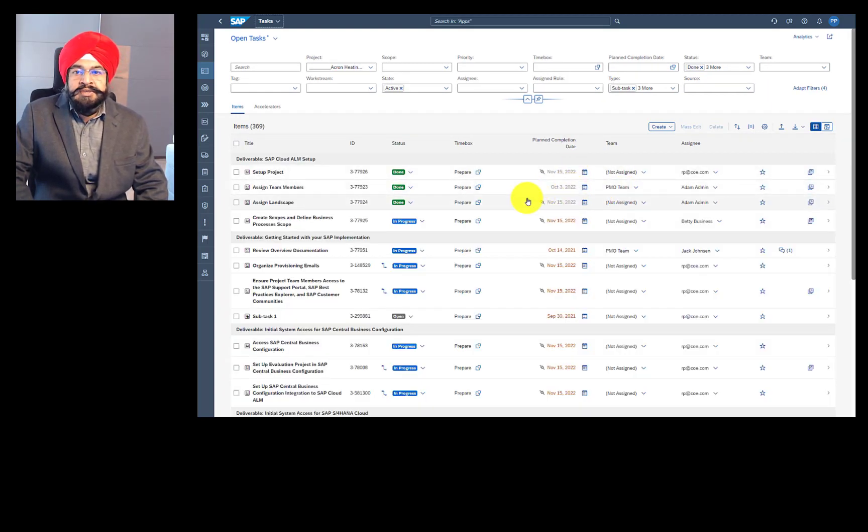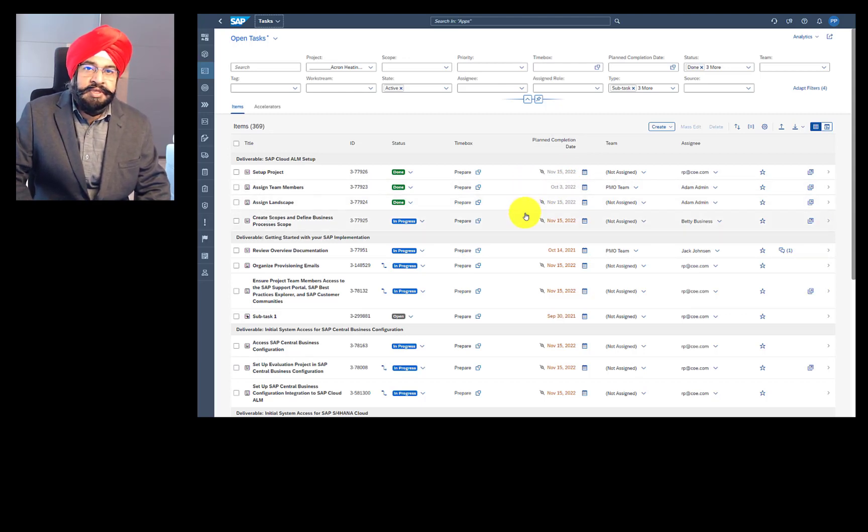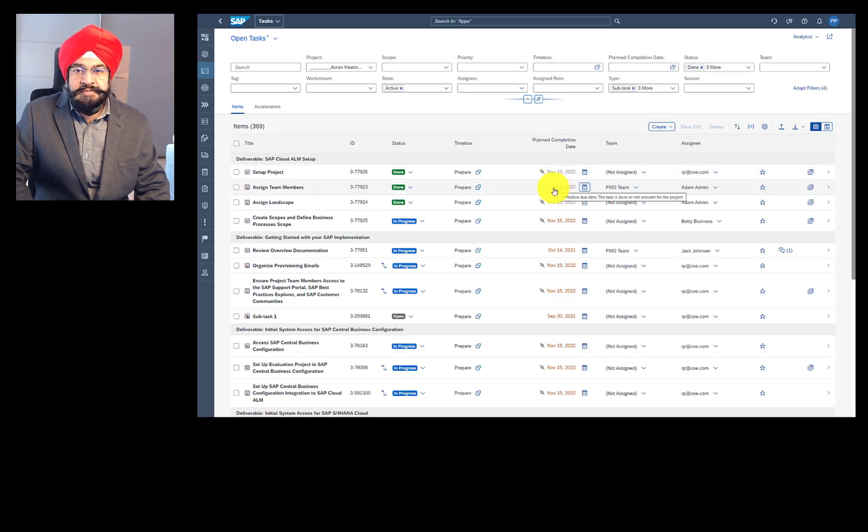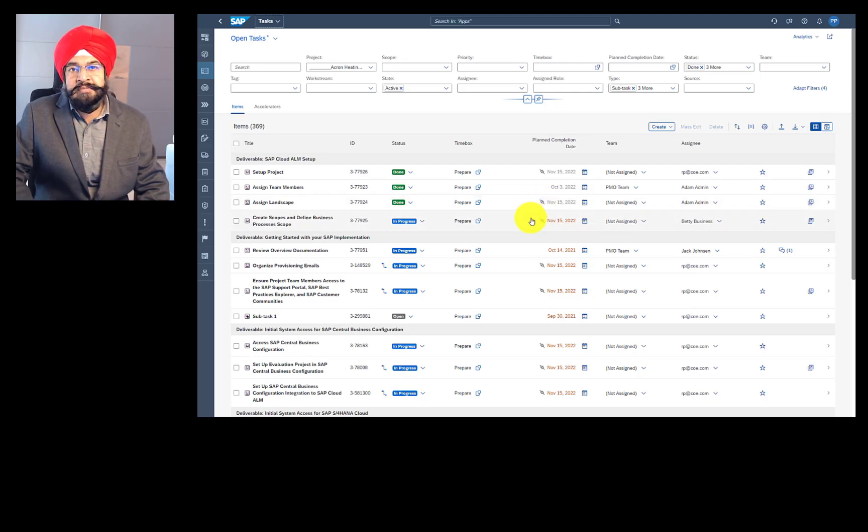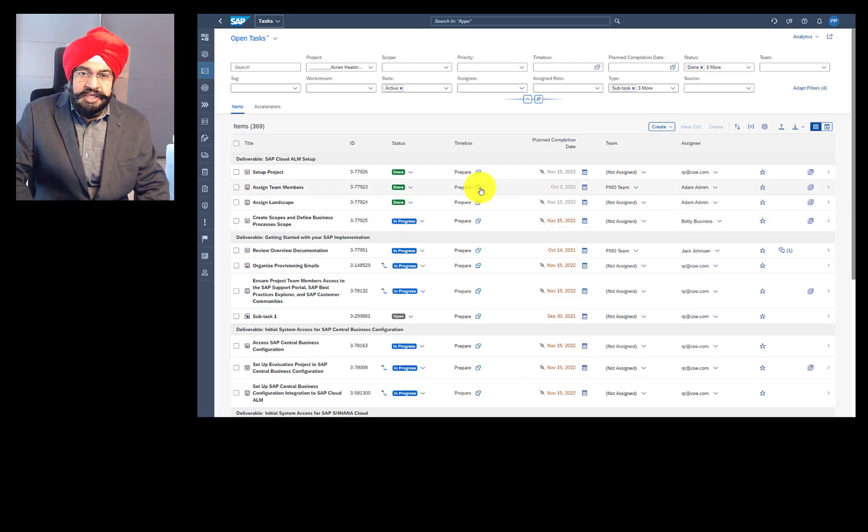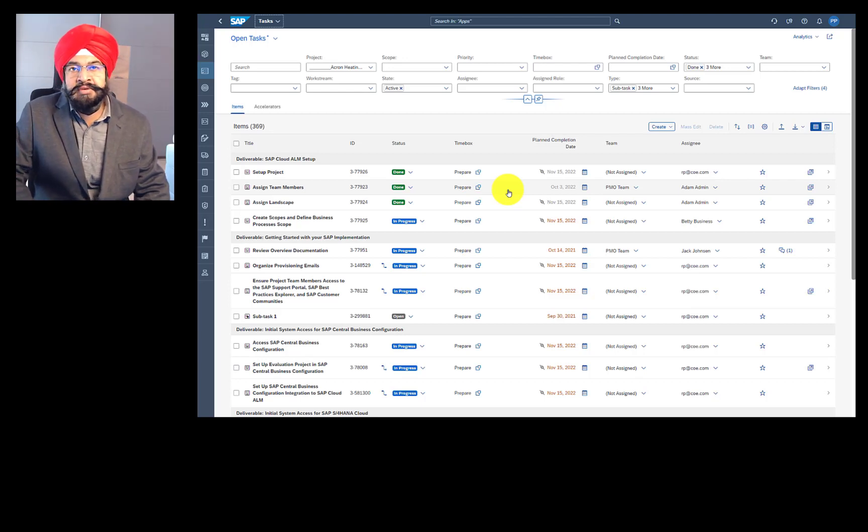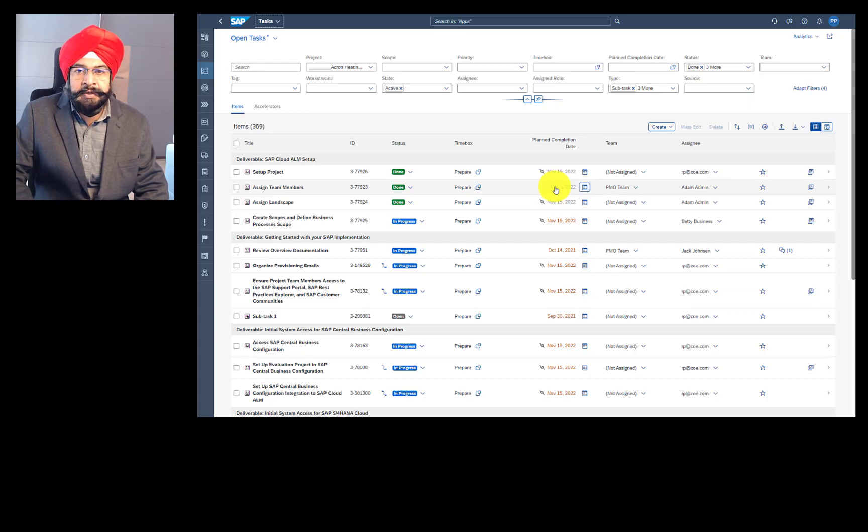So wherever I had October 31st and the link icon, that date should be automatically changed to November 15th. And wherever it was a manually defined constraint, that date should be preserved. Exactly as expected. So this helps you in mass management as a project lead. That means the ideal situation is you do not change the task dates manually, but you play with the timebox states so that your entire schedule is updated dynamically. But in case if there is a special event, such as an auditor is coming and you can't really influence that, then you should actually define it as a manual event.